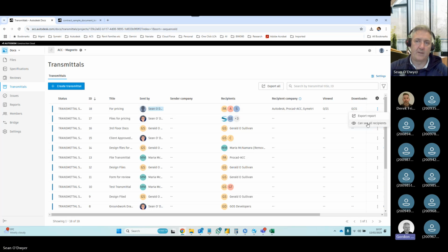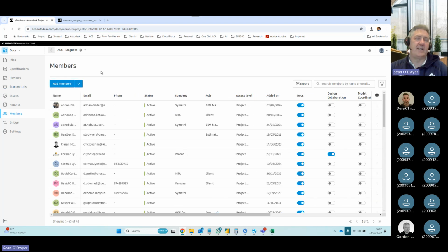So would you use transmittals for sending out a tender package? No, I'd always use submittals as part of it. And there's another thing as well. Transmittals, say if I'm chatting with you and you say I'm talking about the glazing drawings that I've received, I could send it to you as a transmittal, which would be different, because it won't give a report, whereas the submittals will give a report based on it. Right, so it's more powerful.